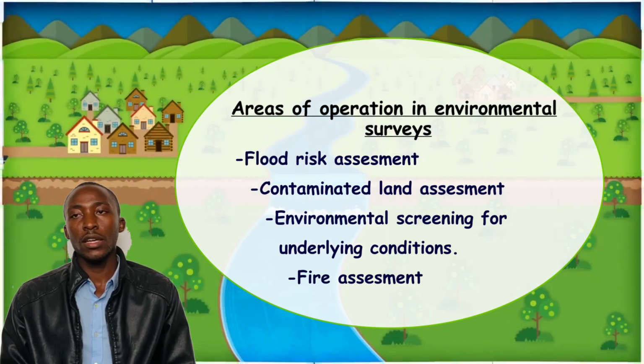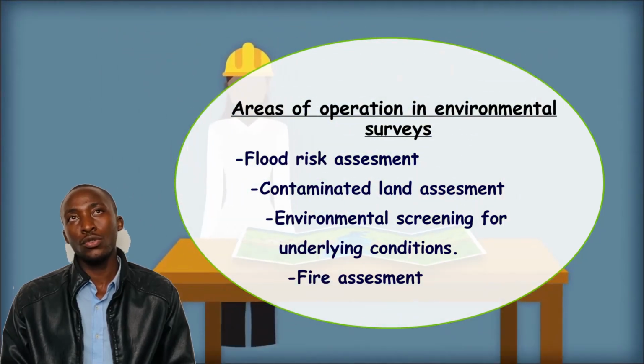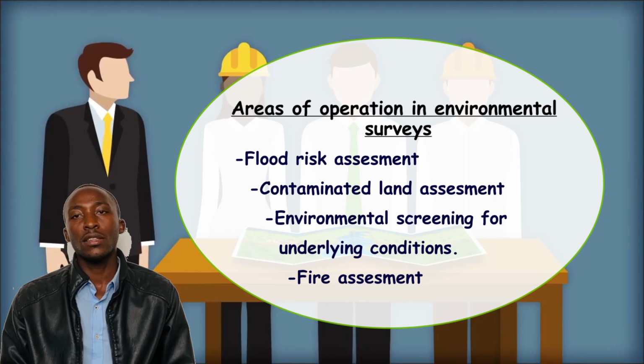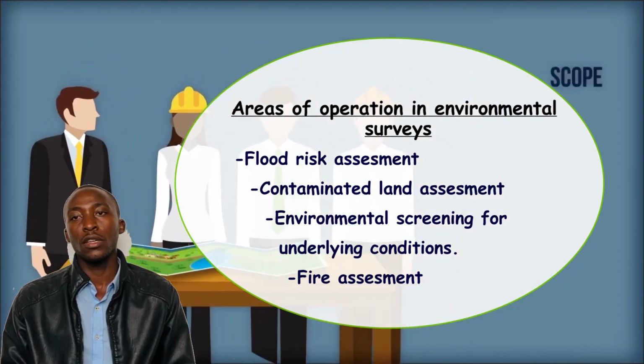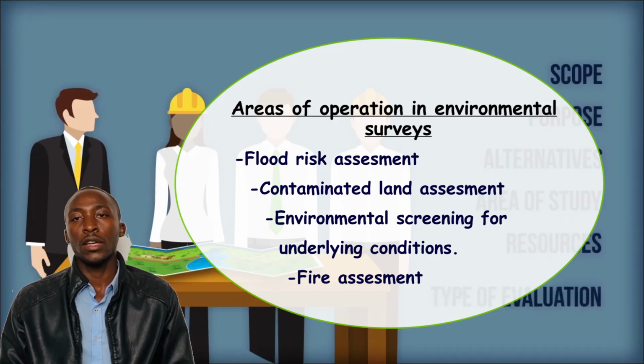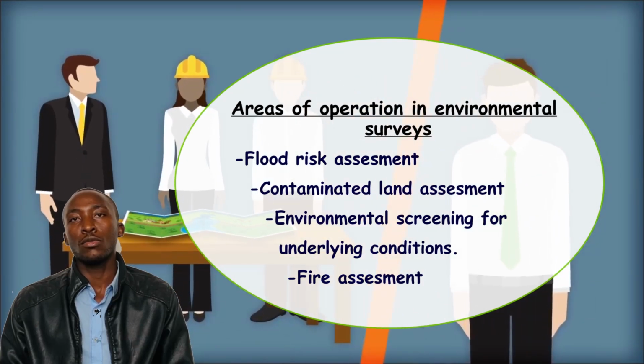Second, contaminated land assessment, where we assess and do due diligence of the level of threat posed to an existing or proposed structure. It is near a site that is currently or has been in the past used for industrial waste disposal purposes. Third is environmental screening for underlying conditions like ground gas or any dangers due to closeness to waste disposal systems.